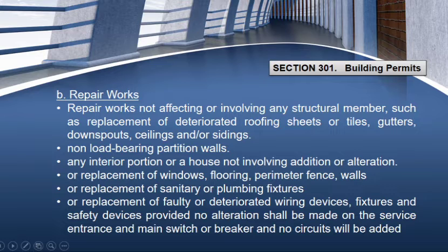Number 3 in the list is any interior portion of a house not involving addition or alteration. Addition means increasing the height or area of an existing building or structure. And alteration means it involves a lot of changes in material use, and the structure, and the partitioning. And if ever na gawin ang addition and alteration to a house or interior portion, it means na hindi na po yung repair works.